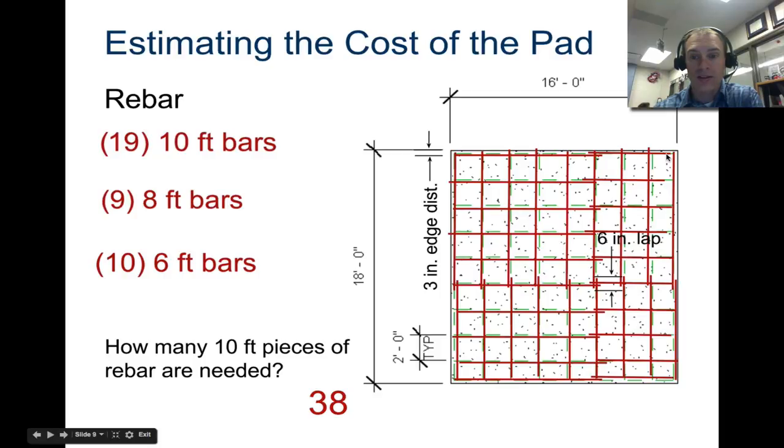Now to overlap these, if we have a 16 foot wide, 10 feet and 6 feet give you 16 feet. If you have three inches open on each edge and then a six inch overlap, we need 1, 2, 3, 4, 5, 6, 7, 8, 9, 10 six foot bars. So that's where we get this. And our eight foot bars are these remaining sections. These ones here: 1, 2, 3, 4, 5, 6, 7, 8, 9. So 9 eight foot bars. So in total we have 19, 9, and 10. If it's sold in 10 foot lengths, then you need 38 total 10 foot pieces of rebar. And you're going to have a lot of scrap. That's just the way that it goes. There are always ways that you can apply different uses for these scraps as well.